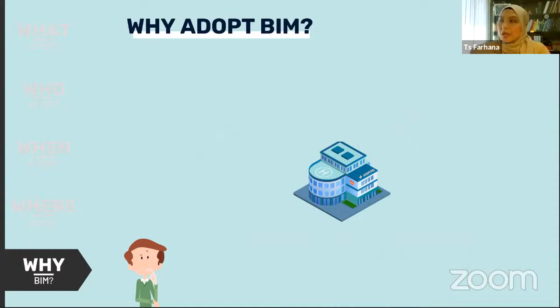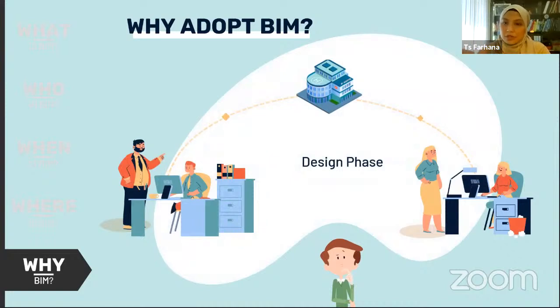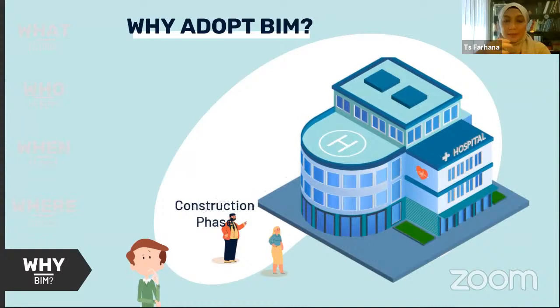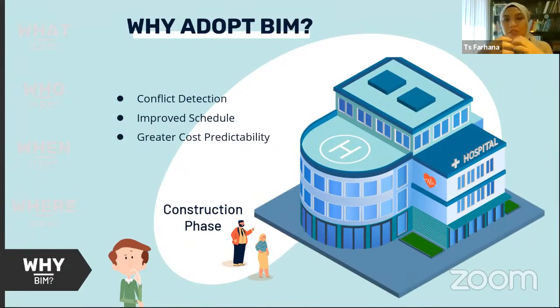So basically, during the design phase, using the same model, whatever we build in the design phase is what we build in the construction phase. It's the same thing. So what happens is we reduce conflicts. Conflicts means, you know, you'll find funny images where the door is in front of nothing, there's no staircase for the door, for example. So we can reduce all this conflict.